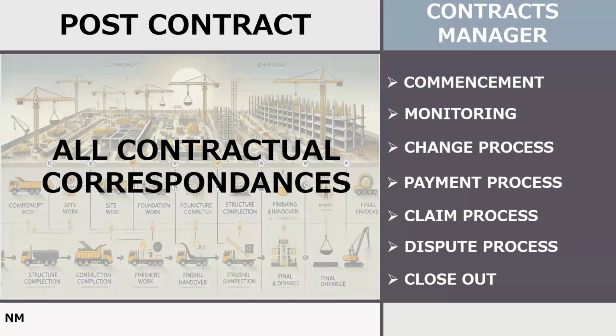Another very sensitive or critical stage in post-contract is the payment process. So when you come to payments, in a normal contract we have three types of payment application: the normal interim payment application, the application we submit at the taking over, and then the final draft at the end of the project. The payment application we send at the taking over is very important. We call it the statement of completion.